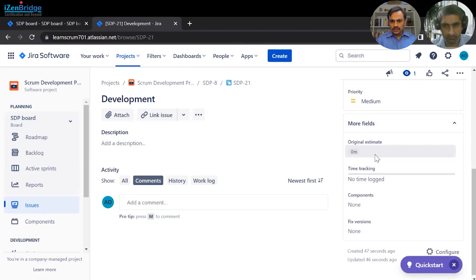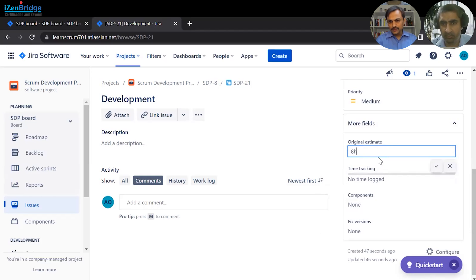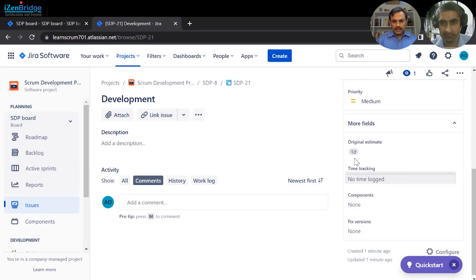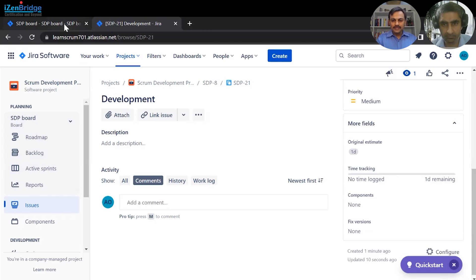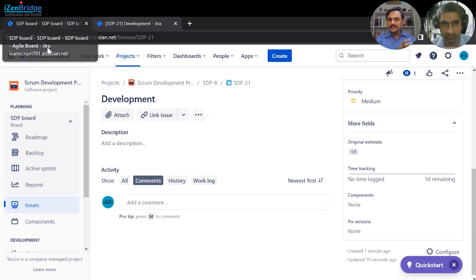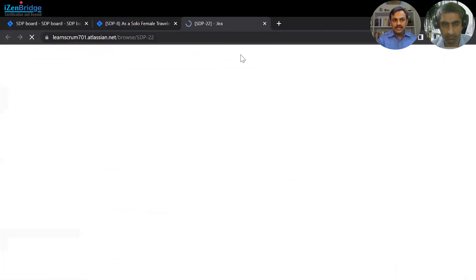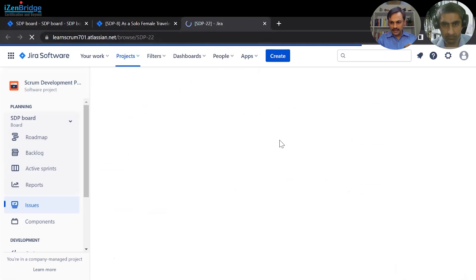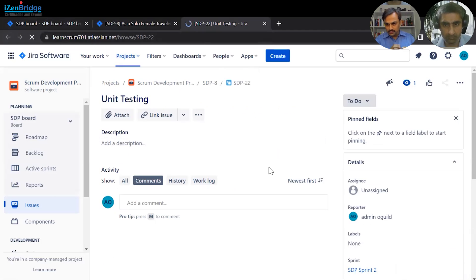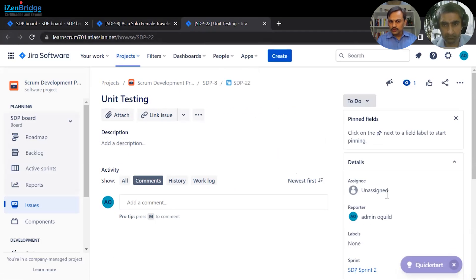In the detail view of the subtask, you can estimate the time. You can estimate in any format: 'M' for minutes, 'H' for hours, or 'D' for days. There is also the possibility of mapping a task to release versions — sometimes you may want to release just a task rather than the whole user story. You can also attach documents such as images or class diagrams for reference. Majorly during sprint planning, you are focused on understanding the item, adding estimated time, and assigning a person.